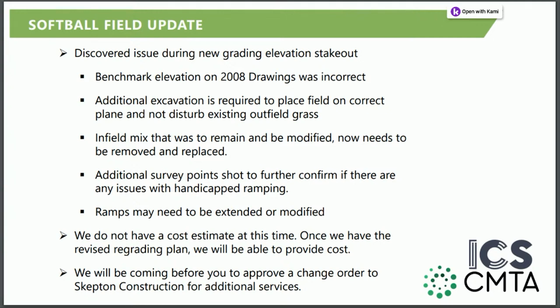Right now, we don't have a cost estimate because we just got the elevations today. We're going to sit down and do a detailed cost estimate, ICS will, square foot by square foot of what has to come out and what was originally called for in the drawings. We will base that against the change order from the general contractor for their additional services. So we will be coming to you in the next meeting with a change order request for Skepton Construction for that additional work.